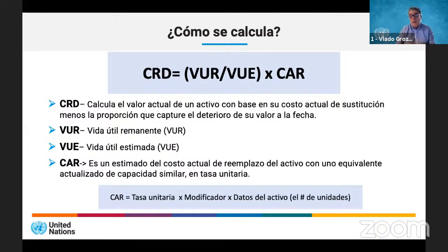Or for area, the same method: we can say the unit cost for replacing the road per square meter is about 10 to 5,000 US dollars per square meter. We calculate the area of the road we have to replace or renew, and then multiply by this unit rate.